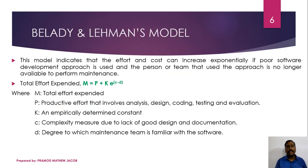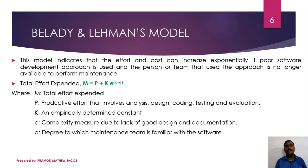The next model is proposed by Belady and Lehman. This model indicates that the effort and cost can increase exponentially if a poor software development approach is used and the person or team that used the approach is no longer available to perform the maintenance. In order to estimate the total effort, M equals P plus K into e raised to (C minus D), where M is the total effort expended, P is the productive effort involving analysis, design, coding, testing and evaluation, K is an empirically determined constant, C is the complexity measured due to lack of good design and documentation, and D is the degree to which the maintenance team is familiar with the software.